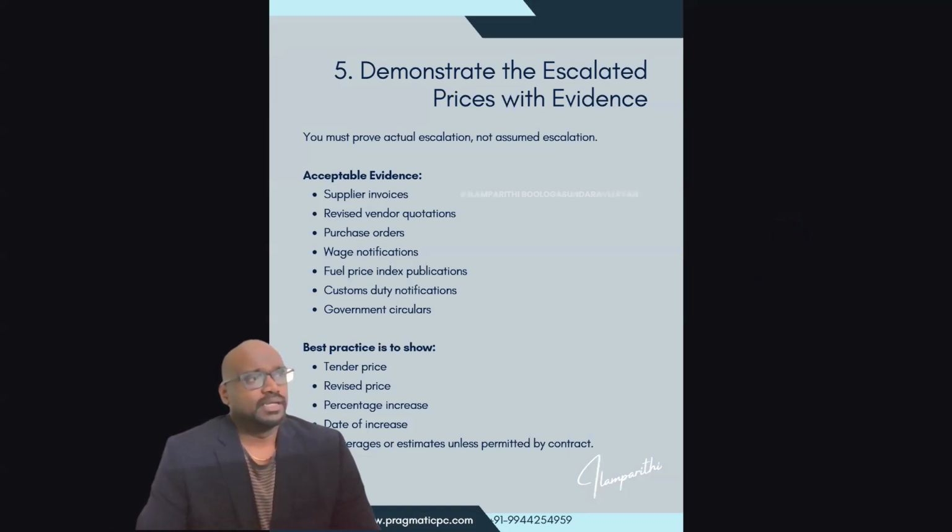Demonstrate the escalated price with evidence. So here comes the most important one. What are the acceptable evidences? Usually, when you go for a negotiation for price escalation, supplier invoices show that that is your actual cost. You have already paid it.